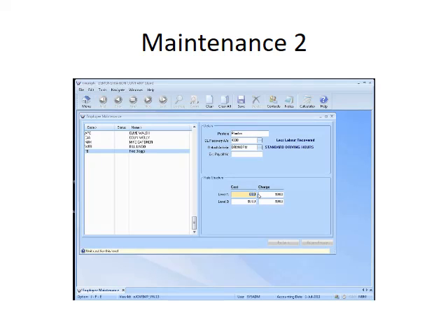So we would normally work out a standard cost for a person. The rule of thumb I normally work on is whatever they're being paid, you double that, and that gives you a rough figure for what their real cost is. But there is a bit more science to it if you want to sit down and work through that. So you normally then put in that the person is going to cost you $50, and you want to charge them out for $100.